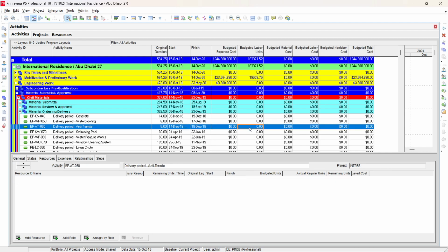The first step in making the changes is that such changes are very major and there is no undo in Primavera. Primavera now offers an undo command, but with such big changes you cannot revert everything back. So it is always a best practice, when you are making such changes, to make a copy of this program.